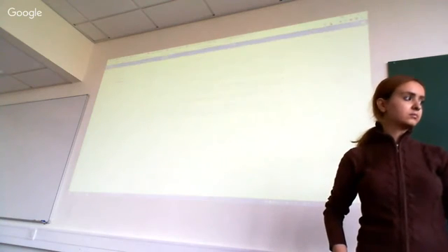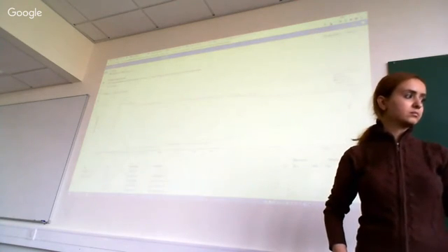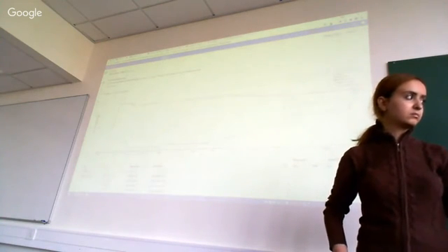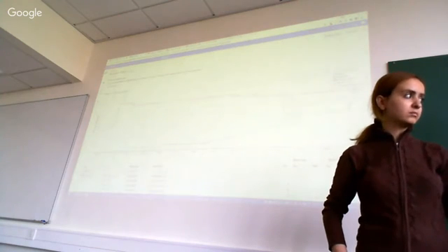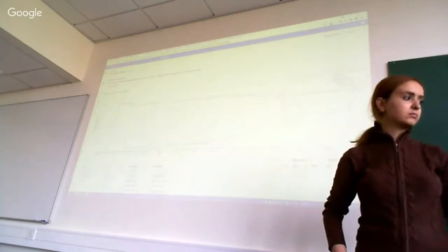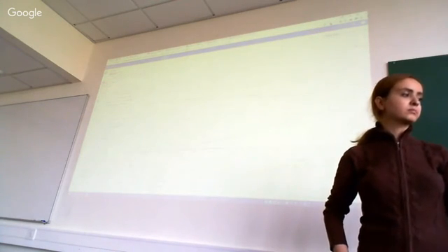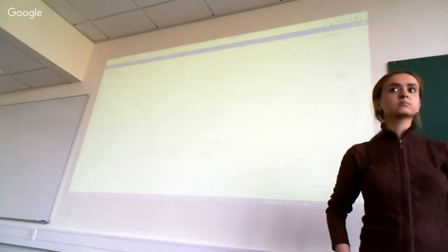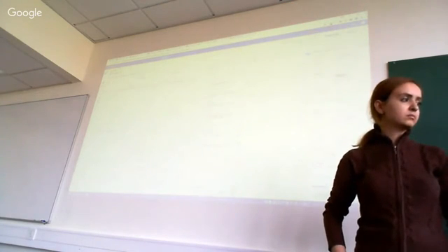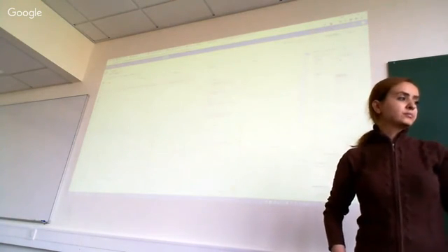And as for Jira, here is the burn-down chart. This is work hours and hours spent. Not impressive, but I think some of the issues we forgot to create an estimate on. But yeah, the chart looks bad. And some of our issues were too big, I think. They were too general, so we weren't able to complete them in this sprint. So for the next sprint, we should try to divide it up more and make smaller issues out of the bigger ones.